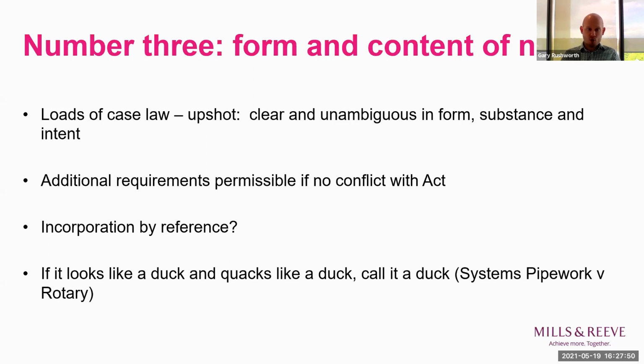There's a slightly ridiculous point on the slide about ducks, but in the Systems Pipework case, the court made the point that in relation to pay less notices, the best approach is to refer in the notice to the relevant clause that entitles you to serve a pay less notice, and to actually call the document a pay less notice on its face.